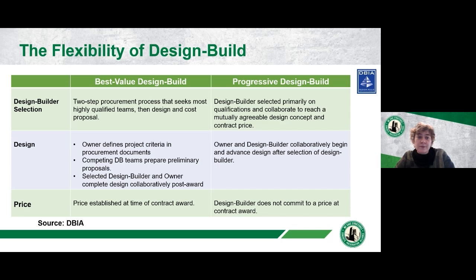When it comes to the different approaches to design build, as I mentioned, there are two primary approaches. What has often been called traditional design build, or what's now called best value design build, is where pricing for the entire construction project is known by the owner on day one, before they make a decision of which design builder team to select.